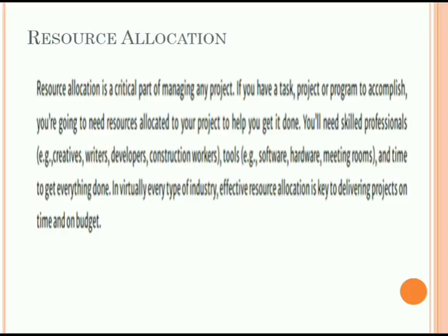Resource leveling is the action of adjusting the project start and finish dates based on the resource availability or constraints, which in turn balances the supply and demand. Resource leveling is used when the limits on the availability of the resources are paramount. It simply answers the question: with the resources available, when will the work be finished? Whatever the answer to that question is, that is called resource leveling.